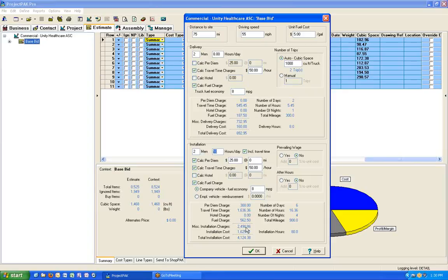The beauty of this is that you can start changing numbers to see what it does ultimately. Right now we're at almost $2,500, but maybe if you change the hours to 12 hours a day, obviously your amount's going to go down because your number of days is less. Or you could go in the opposite direction. Like, instead of having them drive to and from every day, what's the difference if I put them up in a hotel? Is it going to make this number cheaper or more?